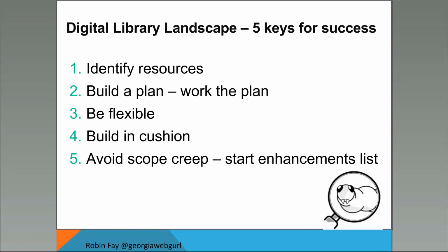Start your enhancements list. When people start asking for things, saying, can we digitize this? I'd like to digitize that. I want to do this. Things may be outside the scope of this project, but you can just start a list. That can make people feel not only comfortable but much more appreciated, and what they're asking for is at least being documented.